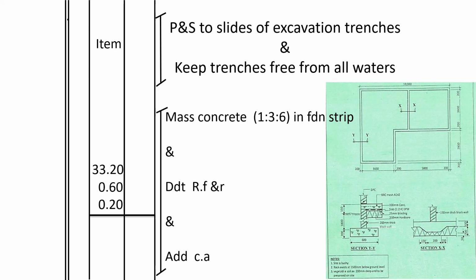So the next step, we need to plank and strut the sides of the excavation trenches. Remember, the external walls are the ones which have a foundation. That's why we are not concerned with the thicknessing yet, because thicknessing shall only concern the takeoff when it comes to the hardcore. So planking and strutting and dewatering the sides, keeping the trenches away from the water, we measure it at item because we allow a provisional sum in the bill of quantities.